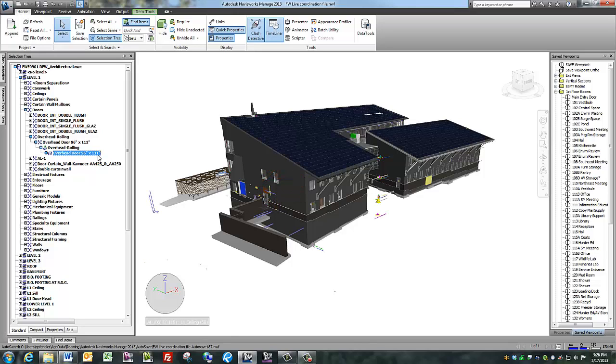Always remember that what you see in the model does not supersede what we owe in the contract documents. Reference the contract documents or a submittal for exact product information.